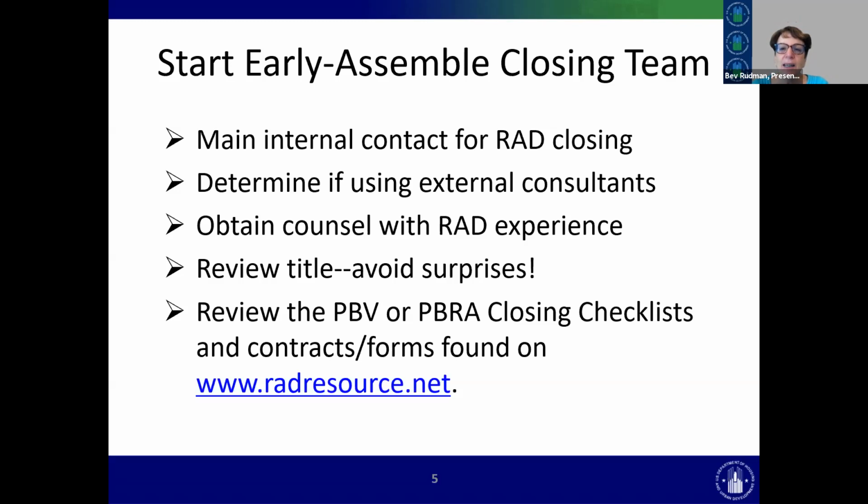So I know we've moved up in our process when we've asked people to get a title report, but getting a title report and reviewing it and taking care of any problems are other steps in the process. Just getting the report is not going to save you. It's using the report that will save you. And again, all these cautionary tales are things that I've seen that have created a lot of difficulties to get to closing, that could have been handled earlier in parallel processing with other things that were going on, and could have saved everybody a lot of time and a lot of brain cells.